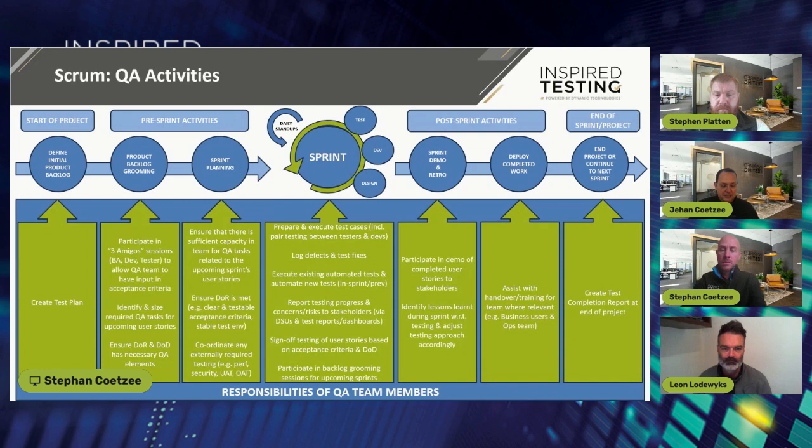There are cases, as Stefan has said, where if it's extremely critical, use the right channels. So if you go to the dev lead and say, this is what I found, maybe that's acceptable, but log all of them. A quick fix is a quick fix, and that's fine, but you don't know what else is around your quick fix. So follow proper process, even if it is a quick fix, and log that so we can trace it and pull the stats we spoke about earlier around that 30% and where that 30% is coming from, because it does impact velocity anyway.